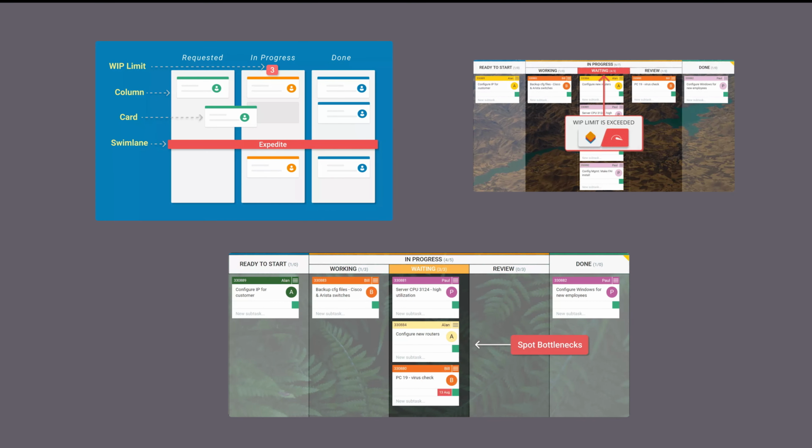But there are some rules that a lot of people ignore and then they don't reach the full potential of the Kanban system. One of them is WIP, or Work in Progress Limits. The Work in Progress Limits rule sets a maximum amount of tasks or cards that you can have in each of the different stages of your workflow. Implementing WIP limits allows you to complete single work items faster by helping you to focus only on current tasks. It prevents task and context switching.